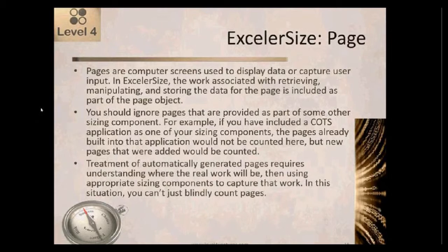For example, if you have included a commercial off-the-shelf software application as one of your sizing components, then the pages that are already built into that application would not need to be counted here normally. But new pages that were added would be counted.